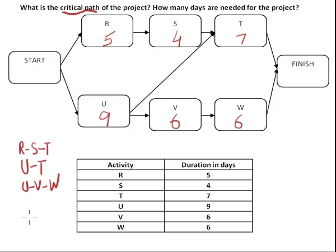Let's add R, S, T first. So R, S, T is 16. It's the sum of R plus S plus T. U, T is also 16. It's U plus T. And path U, V, W is 21. It's U plus V plus W. So it's 21.